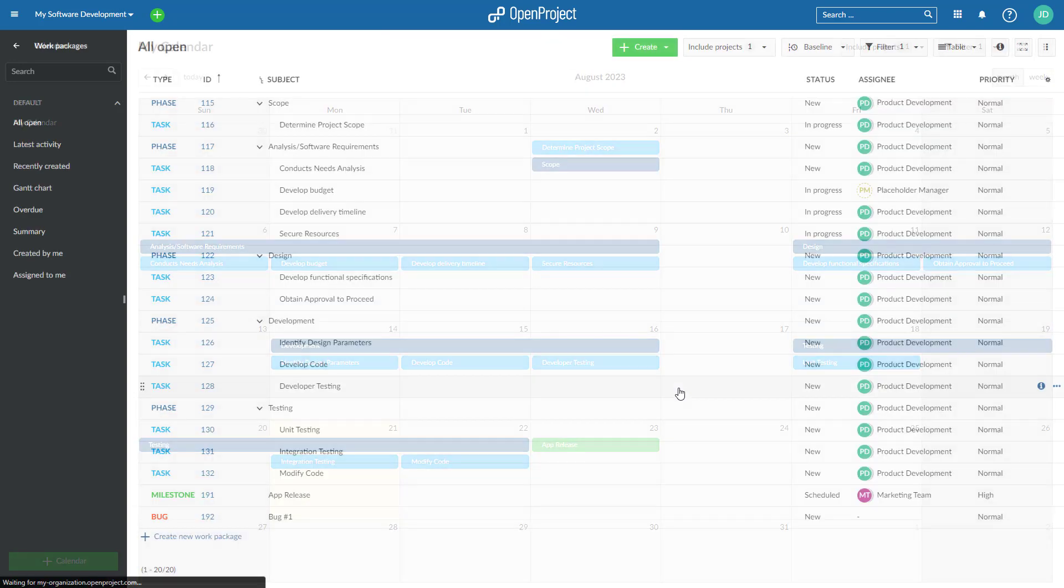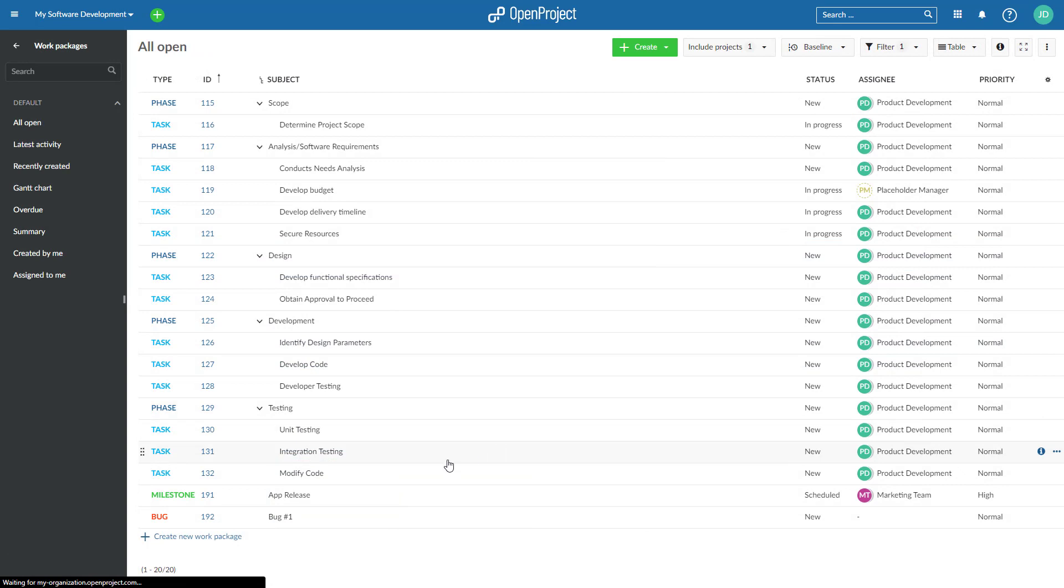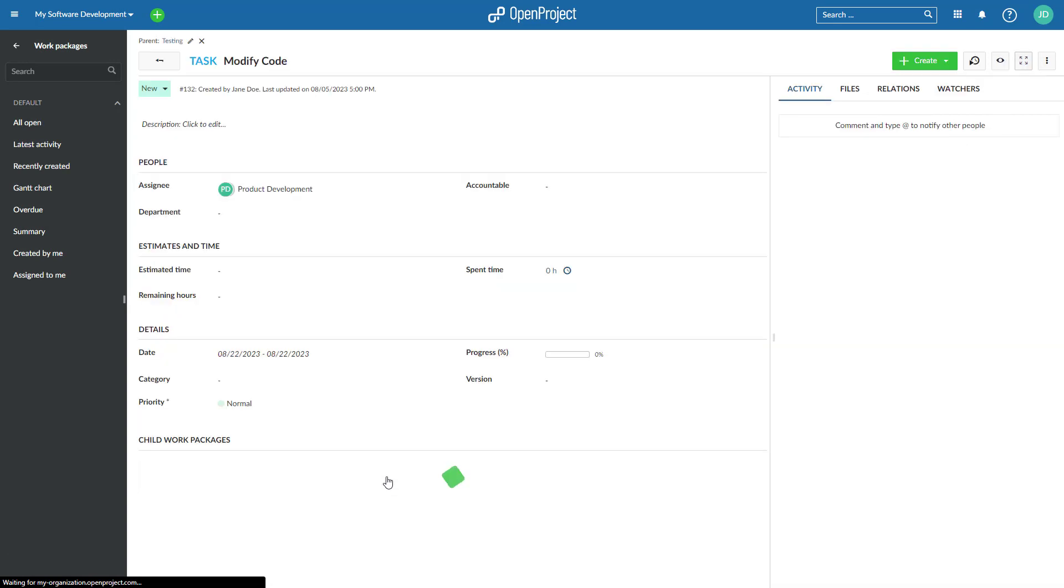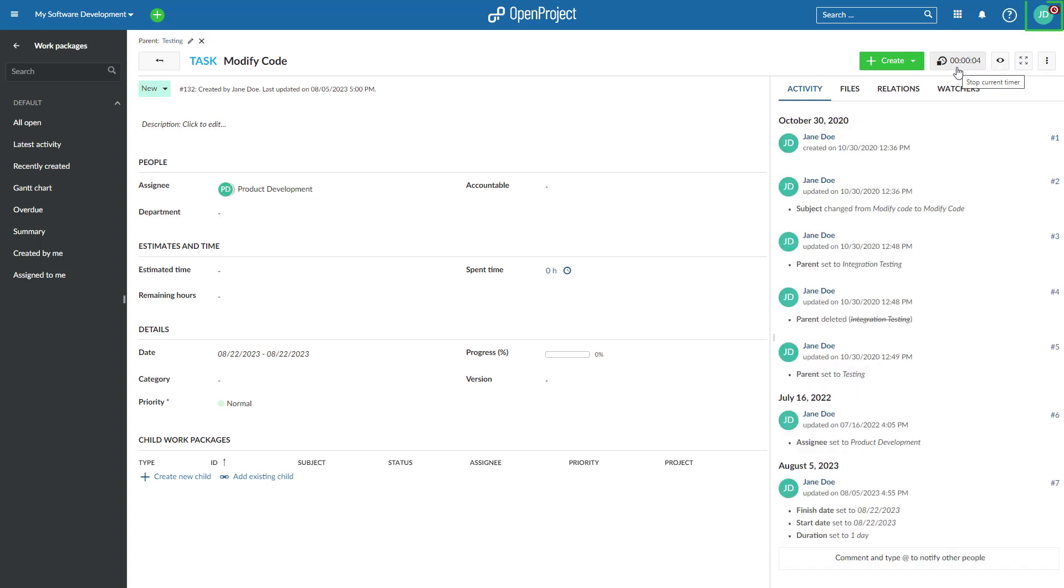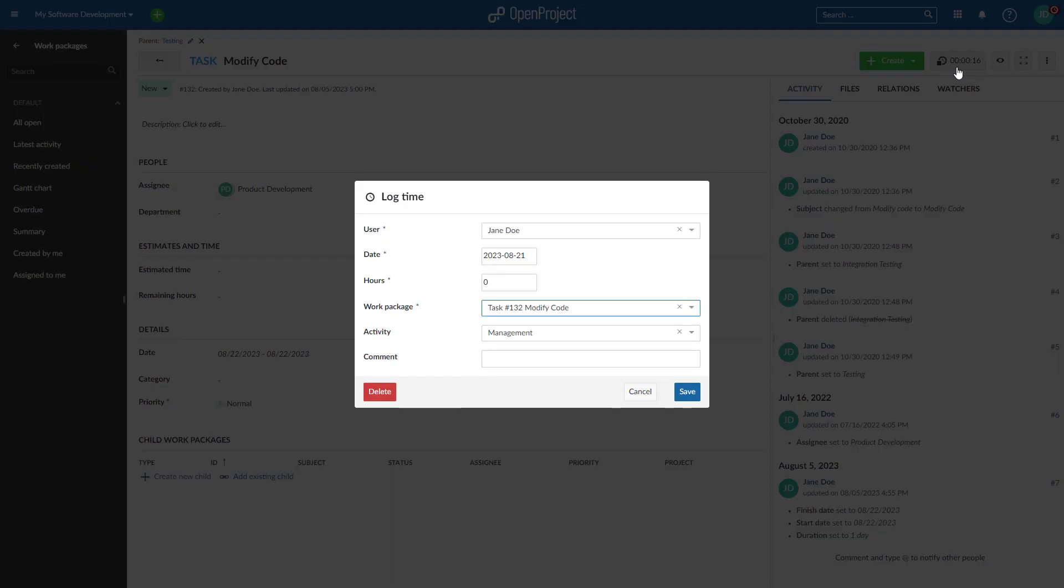We also added a new time tracking button in OpenProject 13.0, making it effortless to track your time spent on a work package. Simply clicking the new time tracking button on a work package will activate the tracking. The avatar in the header navigation will display that time tracking is active. Stopping the time tracking by pressing the button again will book the spent time on the work package.